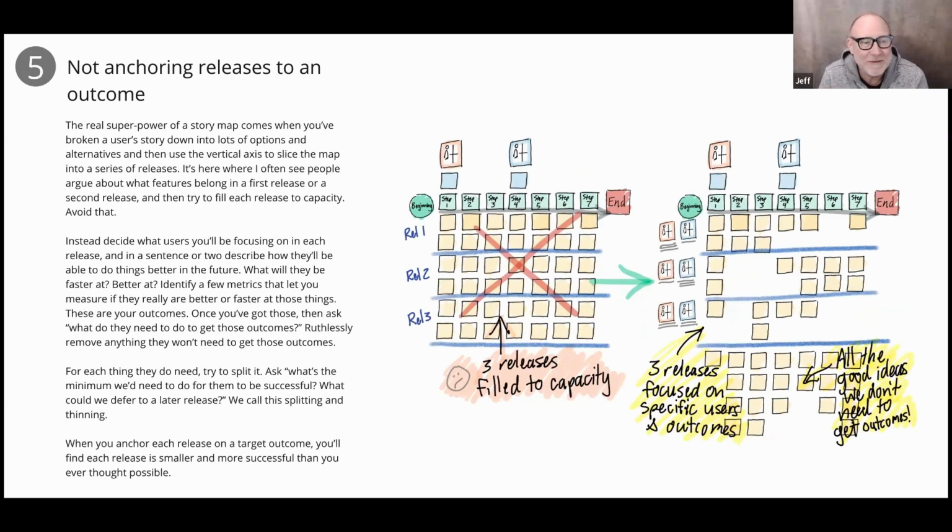One thing to know when it comes to how deep, and then I'll explain what I'm trying to show in those pictures and what I'm showing in that text. The minute you release something and people start to use it, whatever you thought was going to be in the next release will change because of what you see happen when people use it. So you're doing your best to try and predict what people will do with what you ship. But the minute you start to see outcomes, the minute you see people do things, what's in the second release changes. So don't map out 3 and 4 and 5 releases. But